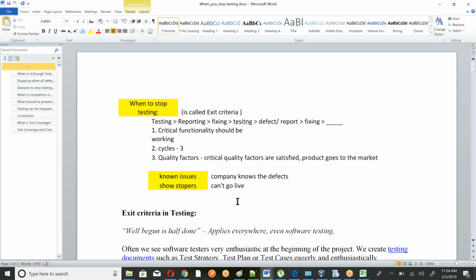It depends on the project manager. If he says, okay, we need to fix it, we will wait for 1 day. They will talk to the developer: okay, how long does it take? What is the criticality? How long does it take to resolve it? And if it is negotiable, like 1 day, then they will put the deployment 1 day behind. Otherwise, definitely they will not go through.